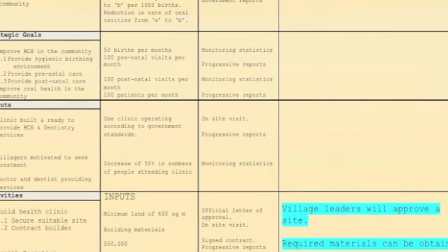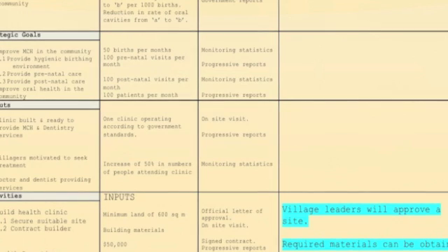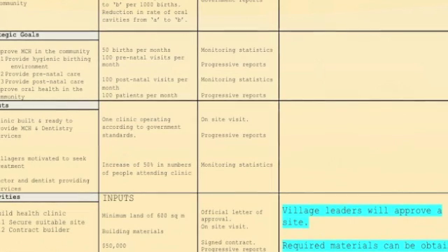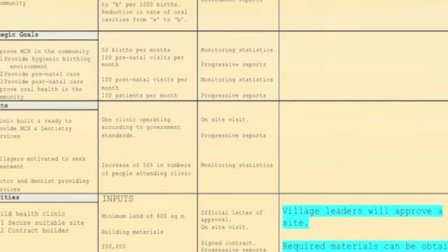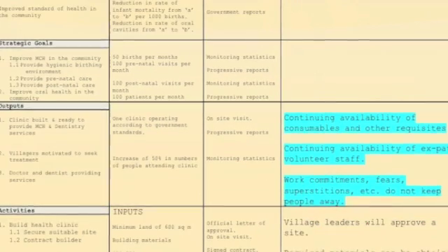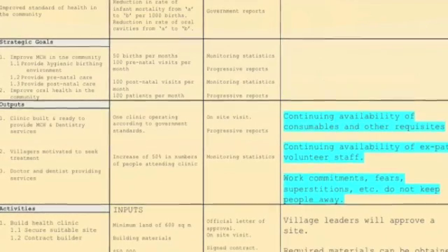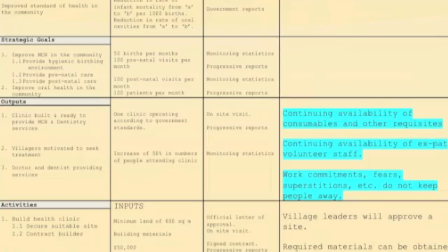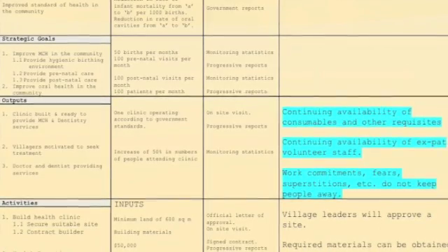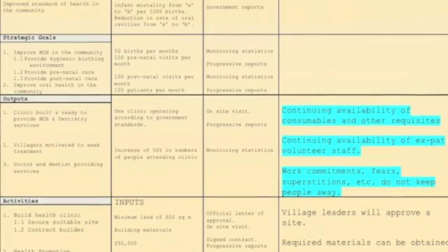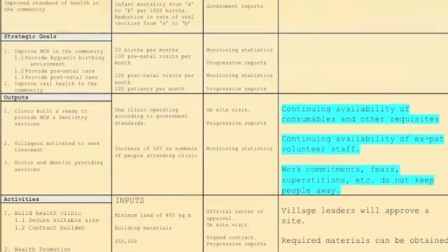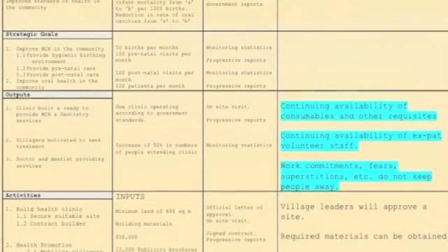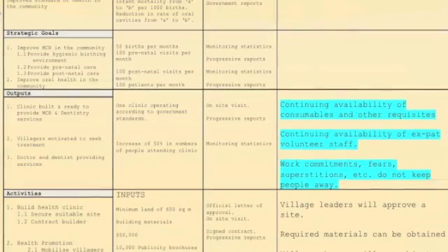Or again, the village shamans are already objecting. We assume the project will not be affected by that, but we are watching the situation and may have to open discussions with them. Similarly, at the output level, we assume that we will have a steady supply of medical consumables. We spell that out here precisely because there is a question mark over it. It's an area we will have to work on. In this way, the assumptions column highlights the risks that the project faces, the very meaningful but perhaps intangible factors that the project managers need to address.